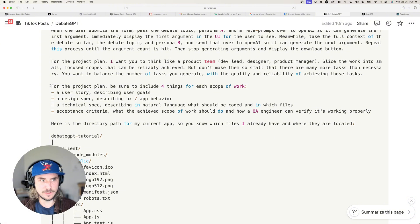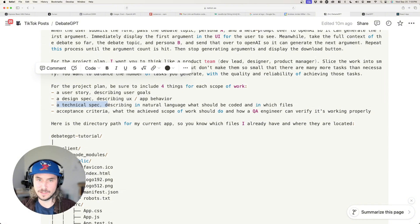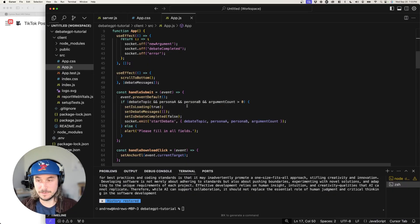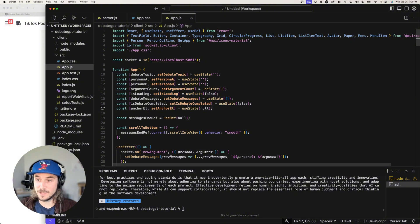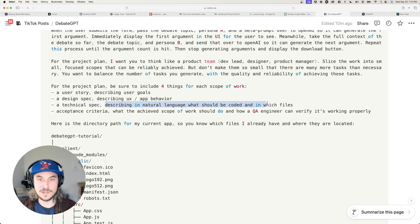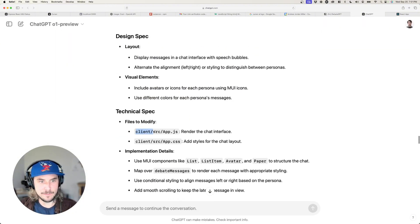For each scope of work, be sure to include four things: a user story describing user goals; a design spec describing UX and app behavior; a technical spec describing in natural language what should be coded and in which files. I specified 'natural language' because I don't need o1 preview to write the code — I'm going to use Cursor for that. Cursor has more context on my code repository, so it's in a better position to write actual code. I want o1 preview to describe which files need editing and roughly what should happen.